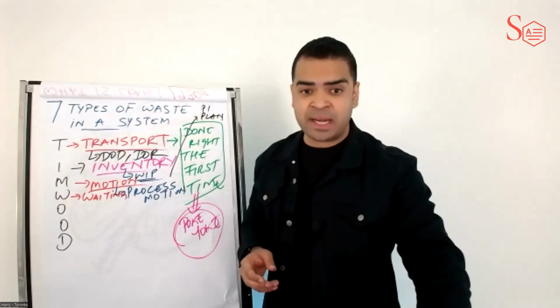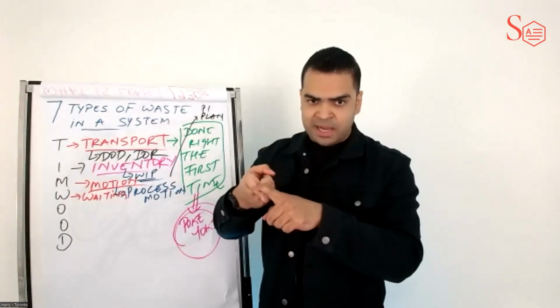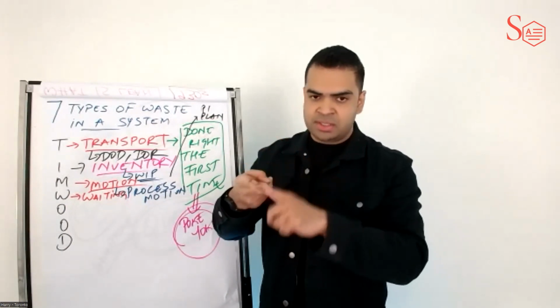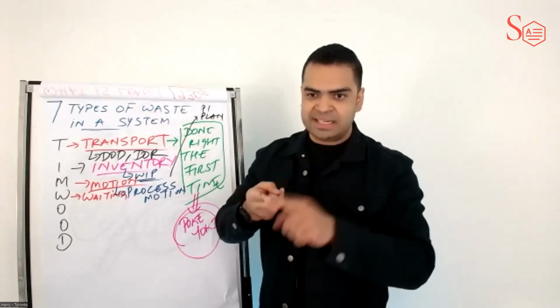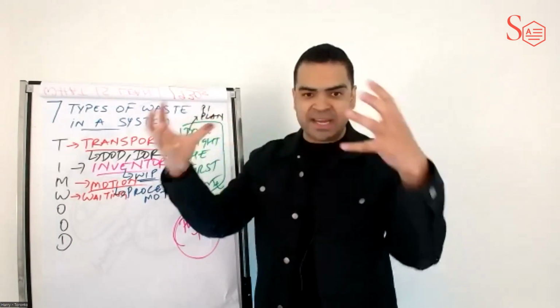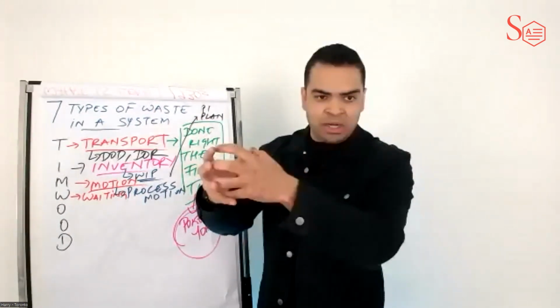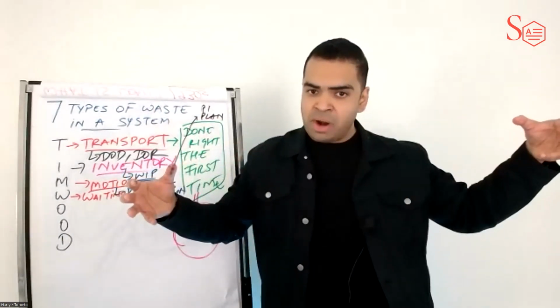Who attends PI planning? Business stakeholders, developers, testers, designers, architects, tech leads, security, compliance, scrum masters, product owners. Everybody gets in the same room to make quick decisions and align on their upcoming priorities.